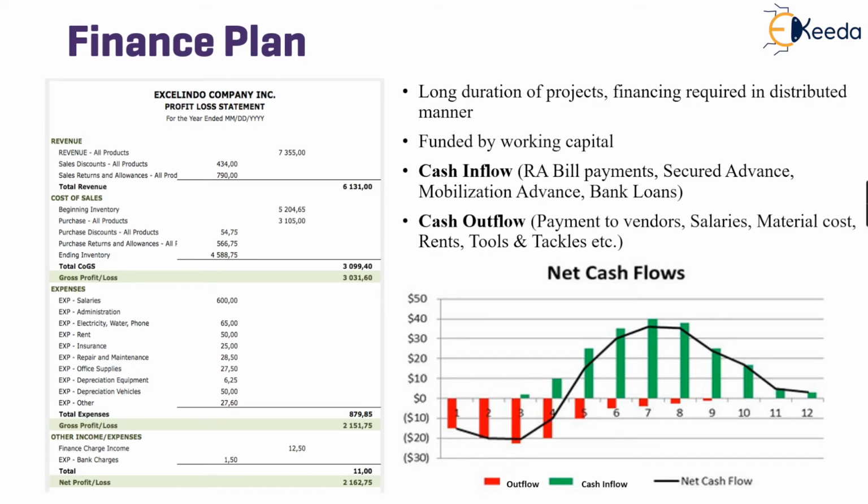At certain points of time, when the activities take longer to complete, it is possible that you won't be able to bill the clients, hence there won't be any cash inflow for the month. However, you have to ensure payment to your vendors, subcontractors, and laborers. Hence, that month can specifically be shown as negative. However, the same money can be obtained in the next month, and thus the project will once again become cash positive.